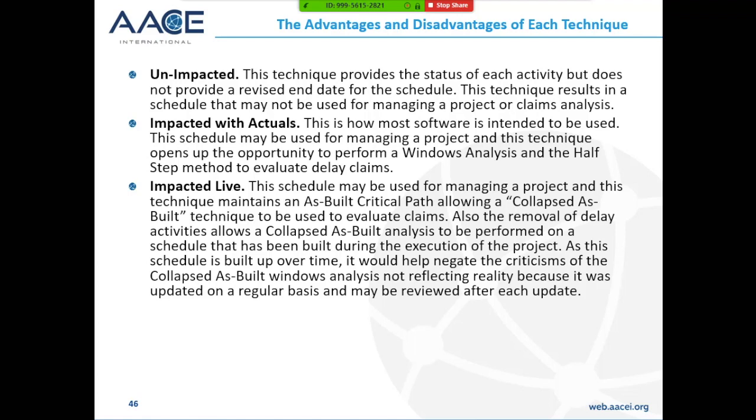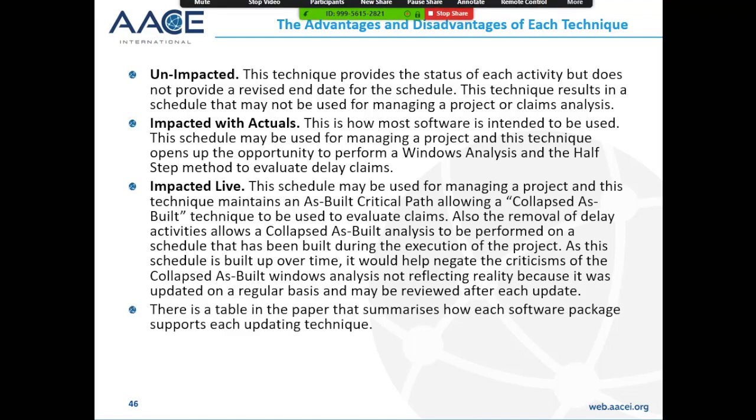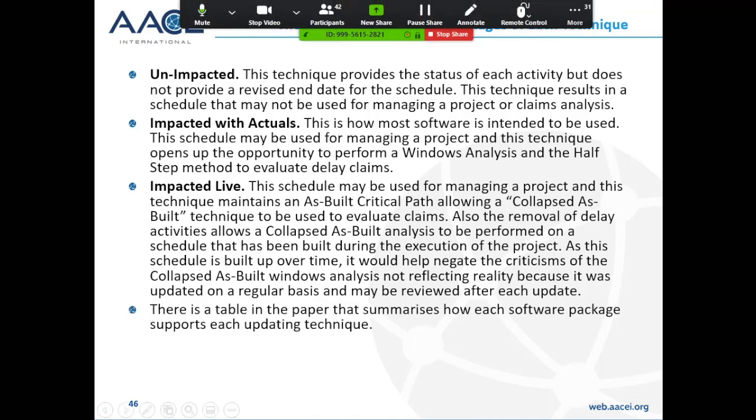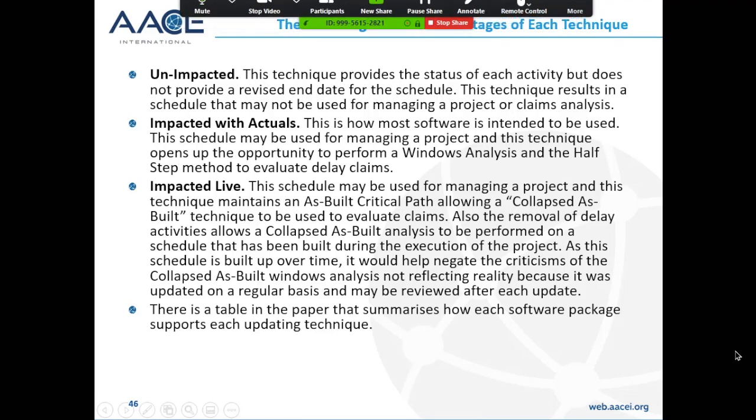Whereas traditionally a collapsed as-built schedule is built by somebody who wasn't involved in the project, a claims analysis person, way after the project's completed. But by doing it as the project is progressing, this makes this schedule far more valid for the collapsed as-built technique. There's a table in the paper that summarizes how each software package supports each updating technique, and I've made a